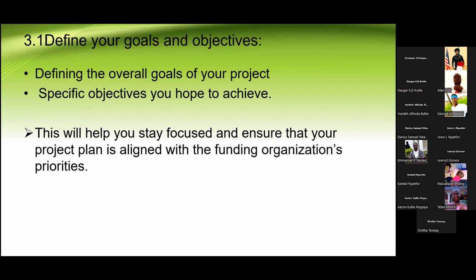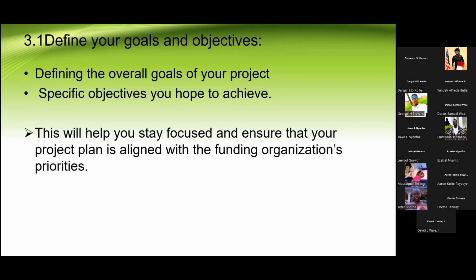So you will want to say provide ARV services for 1,000 individuals in whatever county from January to December 2024. Okay? If you want to break it down further, you will want to say target 1,000 individuals through ARV services from January to December 2024 in Juan town, whatever your town is called there.